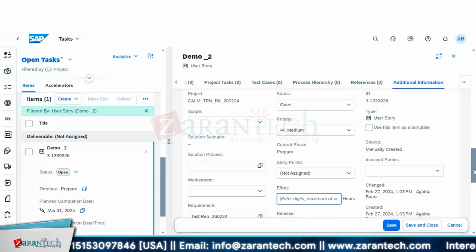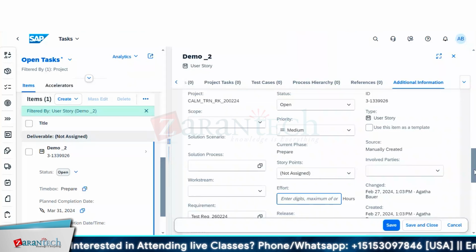Because when you're starting, the scope, right? Somewhere you would go with this flow: requirement, user story breaks down into project task. Or they could say okay, we'll have a requirement, but depending on the requirement, if it is a standard config, no development is required, just a config, then maybe we'll just have a project task, right? I'm just saying, right?